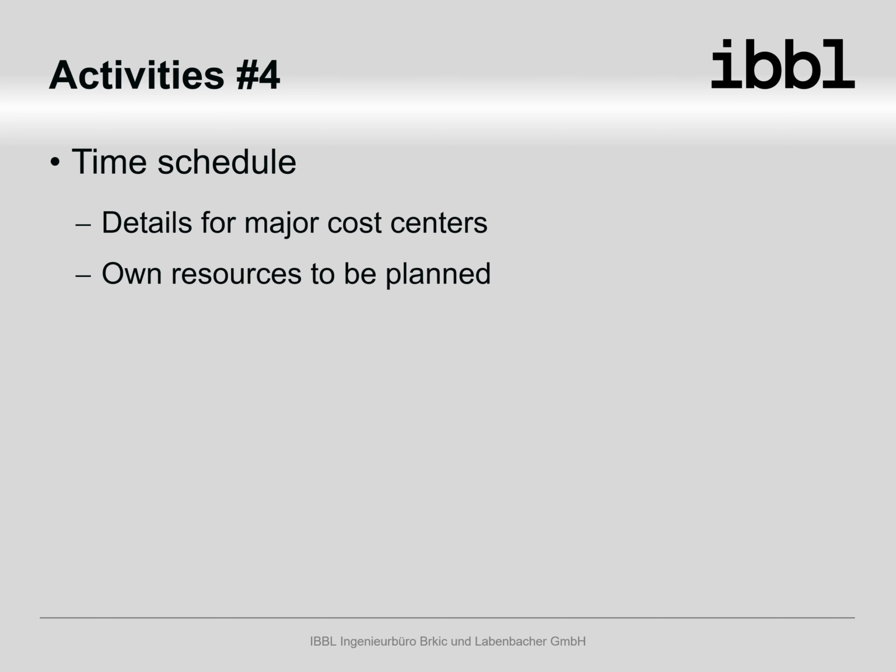The time schedule will be developed for major cost centers of the project already in detail. These major cost centers will typically form the critical path of the project. Other non-critical elements will be shown as summary tasks only. The schedule provides high-level summary information about complete project. Activity groups will be replaced in this schedule with data from bidding process.